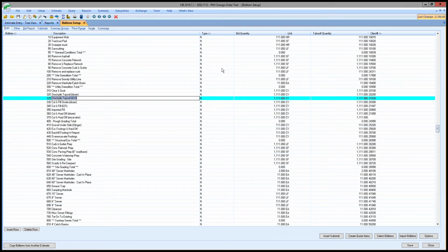It's really difficult sometimes when you do a bunch of takeoffs for a change order and then they want it broken out by labor and equipment and materials, because you have to figure out how much excavator to add for, let's say, the sewer and add for footing, and how do you know what each one needs. So this is designed to eliminate that problem, so you can combine all your labor into one, combine all your equipment into one report, and be able to put it in your change order really simple.